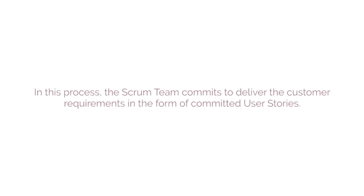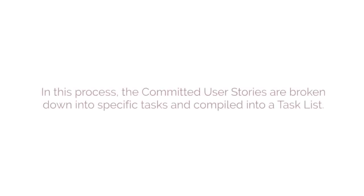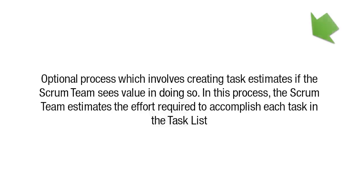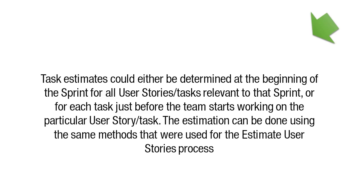Another process that is part of the Plan and Estimate phase is Identify Tasks. In this process, the Committed User Stories are broken down into specific tasks and compiled into a task list. The next process is Estimate Tasks — an optional process which involves creating task estimates if the Scrum Team sees value in doing so. Task estimates could be determined at the beginning of a sprint, or for each task just before the team starts working on it.